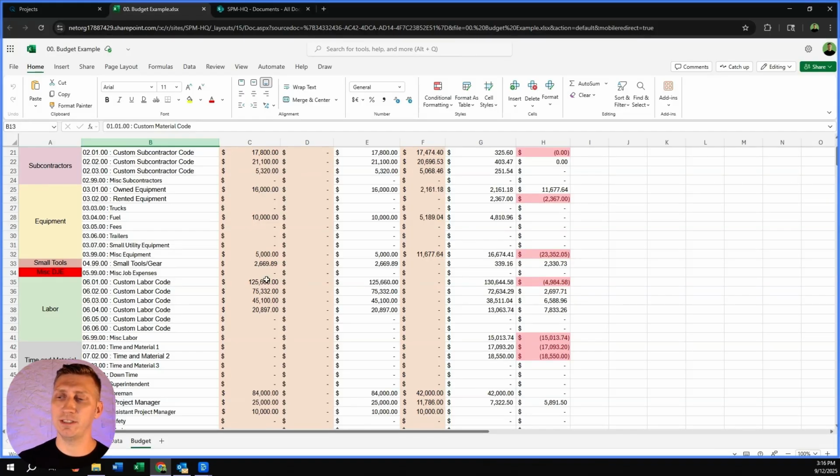But that's how you can really tell, did I make money in phase A or did I lose money in phase A? Because phase B is the exact same thing. Maybe it's floors 3 through 6 and I've only done floor 2. I can tell you if I'm profitable or not. I can see the trends and I can actually make adjustments on the fly instead of just guessing. So I know I went way more in depth than just WIP reports. This is getting into budgets and how to even set up job costing.